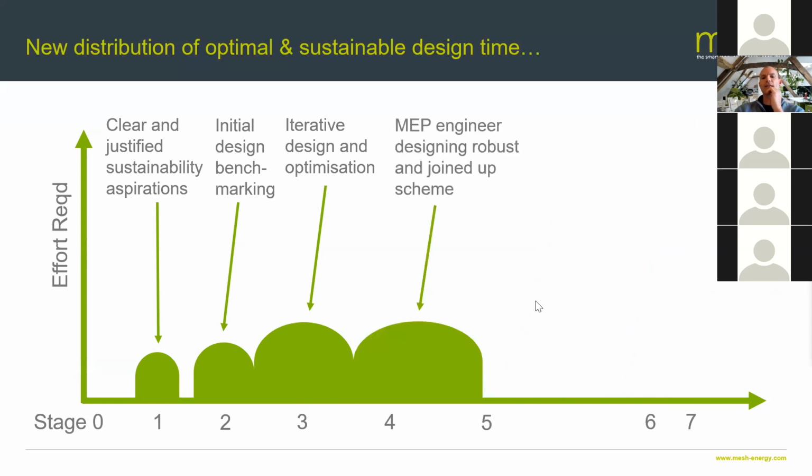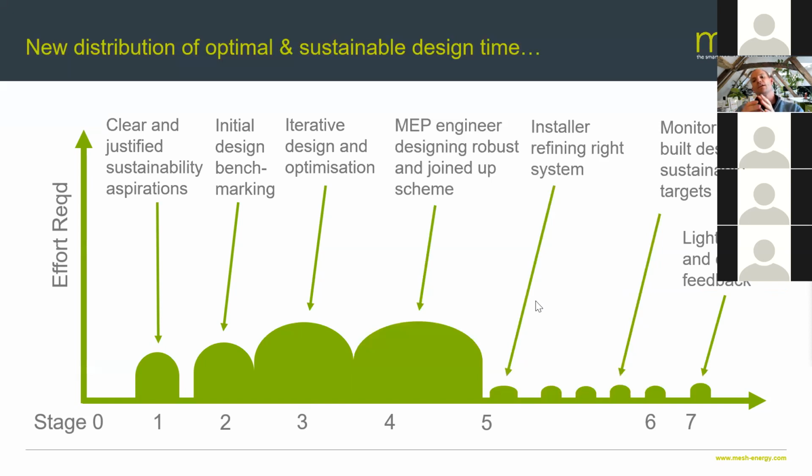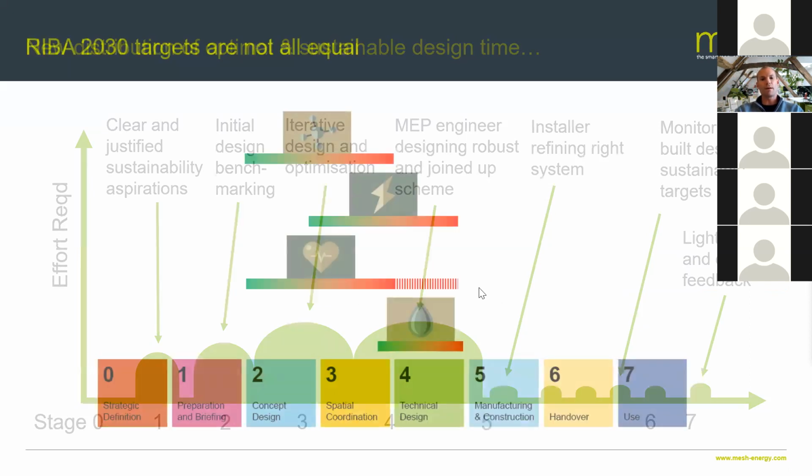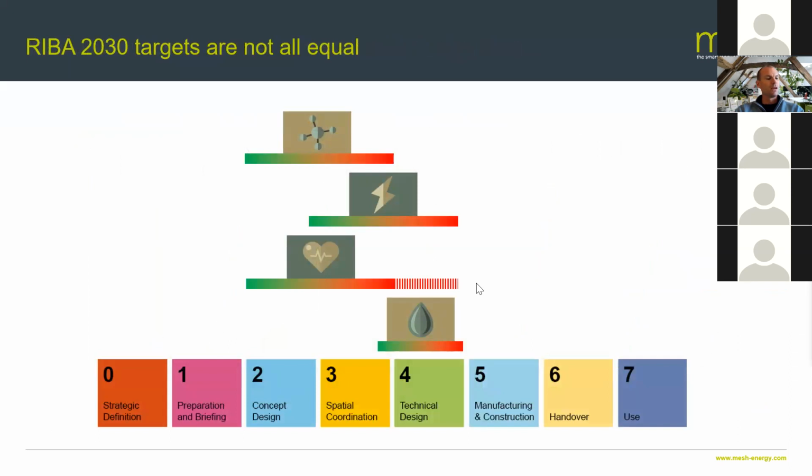And then at the end, you've got your post-occupancy evaluation. And this is light touch, a focus on light touch here. Just getting some simple feedback from the client and maybe looking at energy bills to then compare that to how you thought the project was going to go. So as you can see, this is much more smoothed out. It's much more joined up, much more continuous through the project. Heavily simplified, but it gives you an idea of what I'm talking about here and the sentiment.